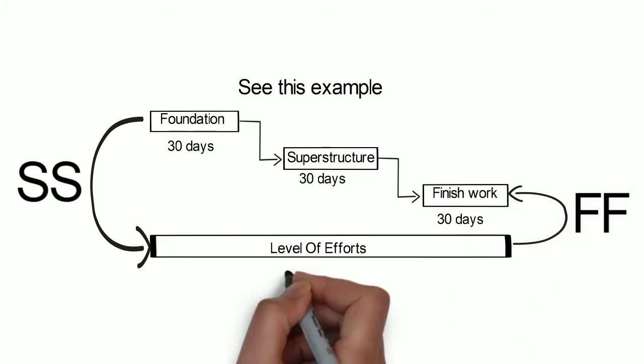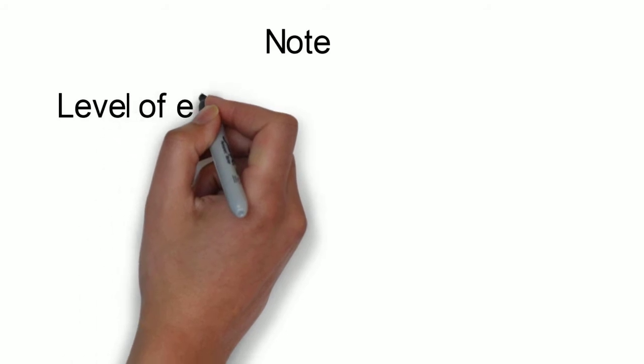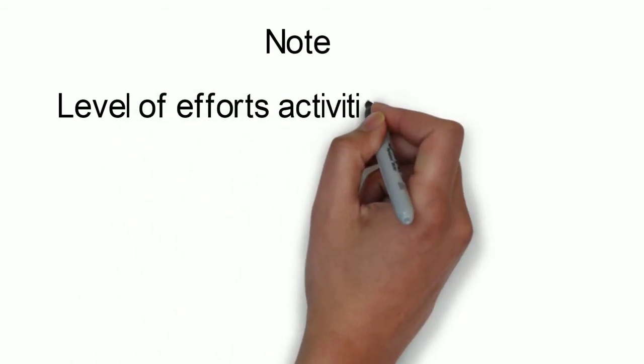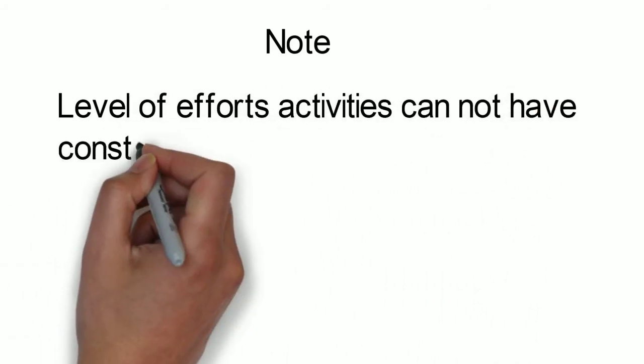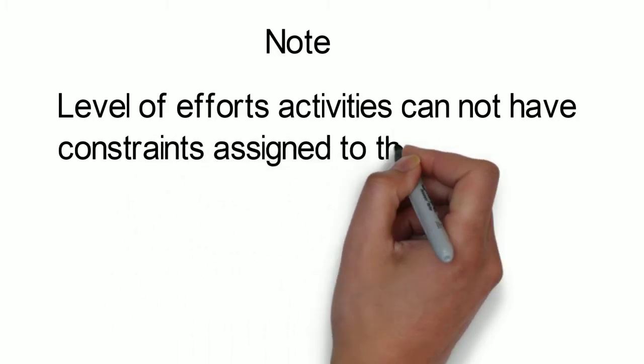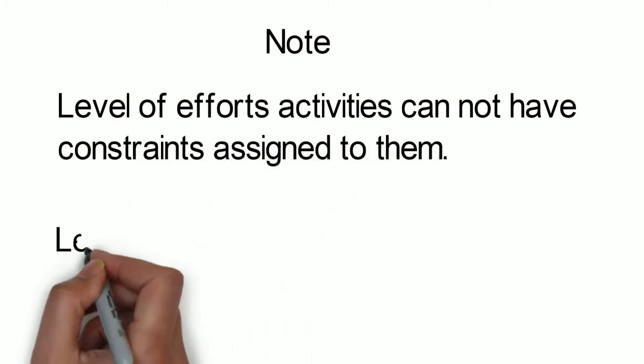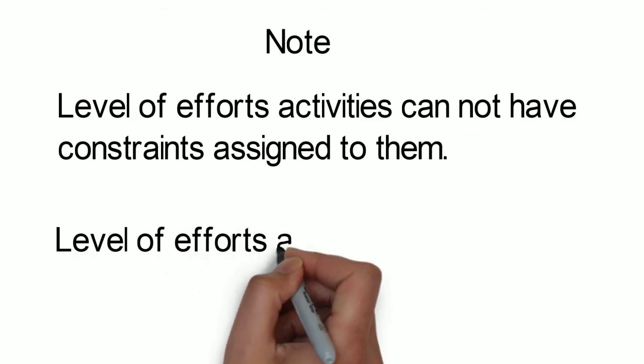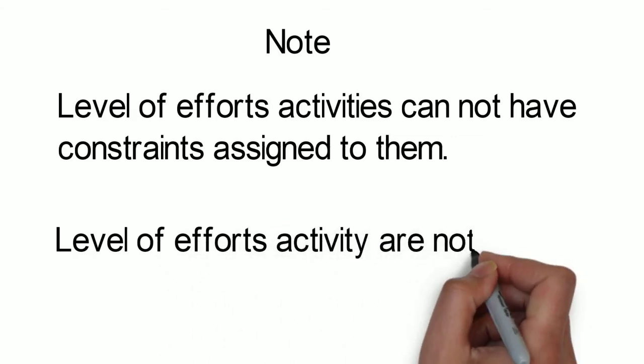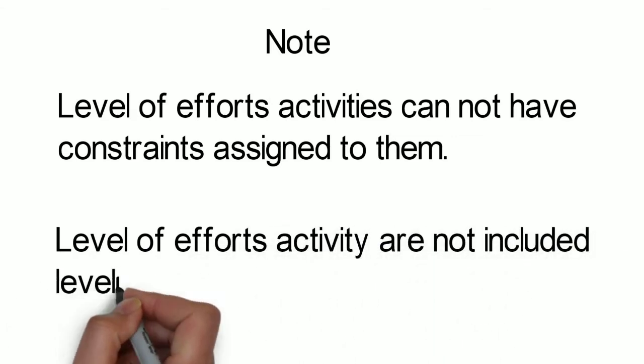It will complete in 90 days total duration. Level of efforts activities cannot have constraints assigned to them. Level of efforts activities are not included in leveling resources.